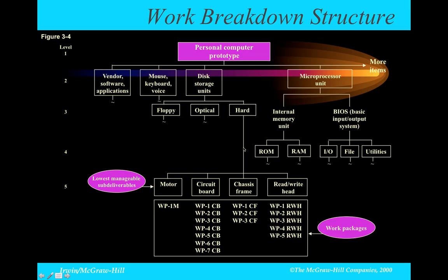If we now go down even further, we're starting to get into sub-deliverables such as the modem, the circuit board, the chassis, the read-write head, and then we go even further down here, which is the work packages now. From the modem, you have one work package. With the circuit board, you have many work packages right here. So there are a number of different things you might be doing on that circuit board itself.